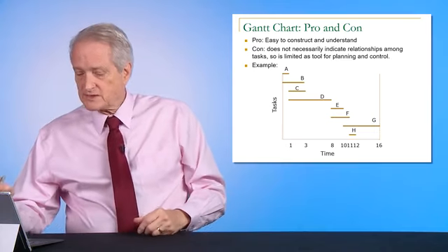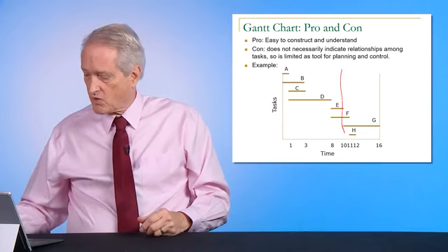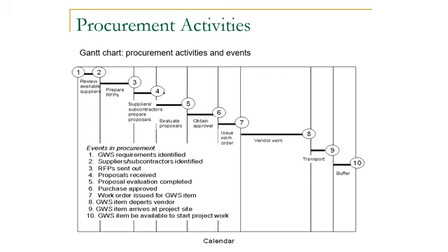So you look at this, it's easy to understand, it's easy to see where you are in a Gantt chart. It's very good for, oh, here's where I obtain approval, this is how I'm doing with stockholders. But the thing to remember is it's just a glance thing. It's not a very good detailed way to do it. It's good for large projects. It isn't good for software projects that are smaller scale.